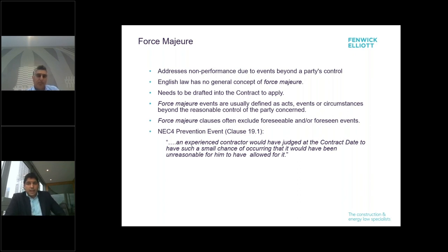And one of the key elements that you'll see is force majeure provisions have to take into account what is foreseeable or what could not have been foreseen. And that very much brings into play COVID and Brexit, because there's a very good argument that now COVID and Brexit just reflect tough market conditions. So if you've got specific concerns in terms of labour supply, price of materials, lead-in times for materials, you're probably going to need some quite specific drafting on the point. And if I was a contractor, and it was a particularly important point to me, I'd be looking at my priority clause if I'd managed to get one at the front, and I'd want it as far up as the top as I possibly could.